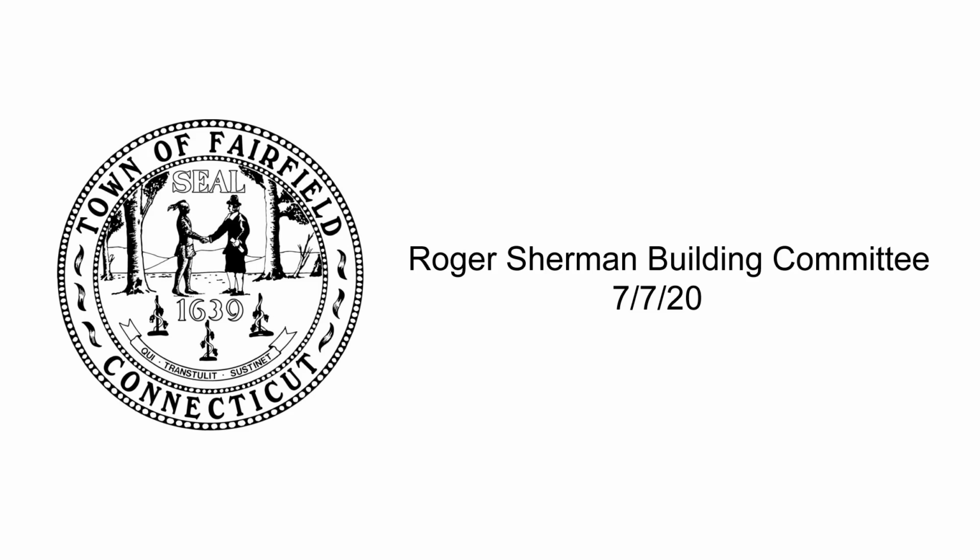Any questions for Marty from the committee? It's Meredith. It's either for Marty or Mark. I know there was some discussion from the custodian, Joe Sesti, that he wasn't happy with how things have been cleaned up. Has that been discussed and addressed? Or maybe Sal could answer that. This is Mark Schweitzer. It was an issue early on. Then we didn't hear anything about it for probably about 3-4 weeks. At the last OAC meeting, Joe was on, and he said it was better, but it's started to lapse, which it tends to do in the summertime with subcontractors. With no one around, they tend to not clean up as well as they should. So we asked that Diversity jump on the subs again to remind them that they have to clean up daily. Okay, thanks.